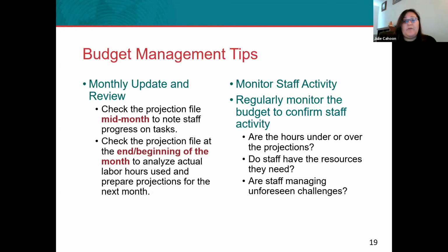And so I think for a budget in particular, just because of pay periods, doing a check mid-month or following the disbursement of payment for your staff might be a good way to track your budget. But always definitely checking in on your budget at the end or the beginning of a month so that you can see what happened within that last month in terms of hours used or fees spent.